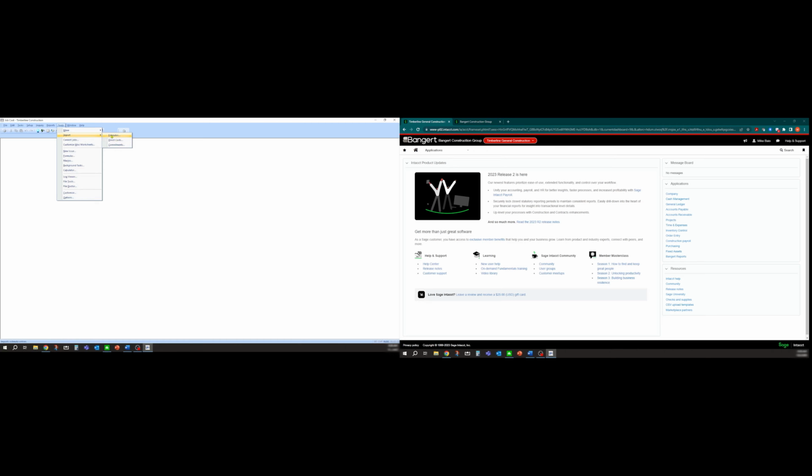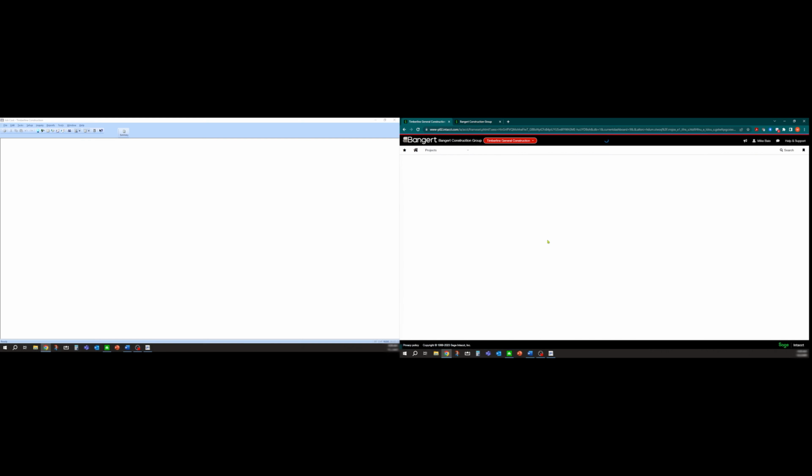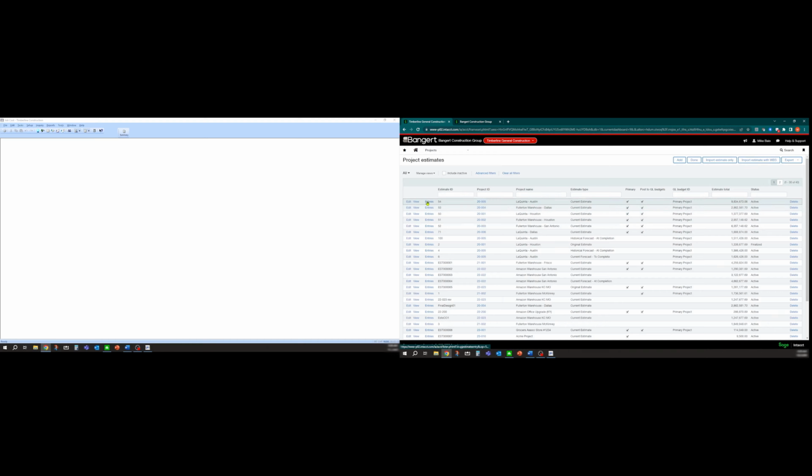So typically what happens is if an estimate is imported in 300 and it's not correct and it's already been posted, what the user will do is make adjustments to correct it. So you can't just delete it. They'll do a minus or a plus to fix each line. So there's some caution there to make sure that it's imported correctly. Over in Intacct, if I go into projects, I can either do it from inside the project or I can go over to set up project estimates. What you can do here is that stores it as a separate entry.